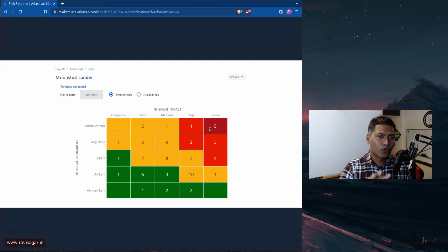Now, number one, you have to make sure that you have these two fields. And this is the first thing. You need two fields, bare minimum. And the second thing is that you need to use the values in these two fields to maybe calculate the risk. Now, you can do this outside Jira. Great. Let us say, you can dump it to your reporting tool.